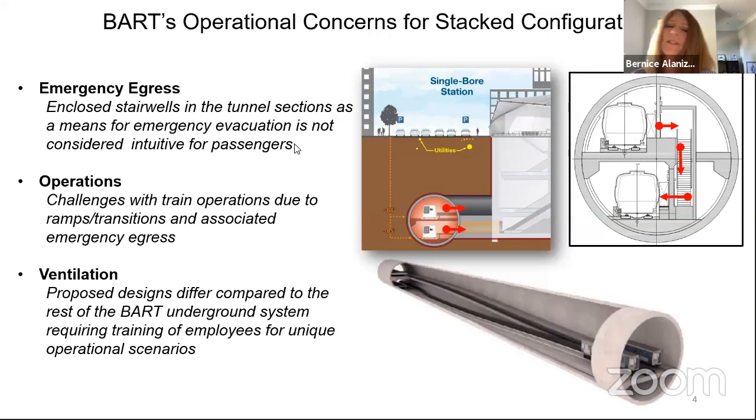We looked at both the larger bore along with both configurations that were analyzed in the environmental document, both the twin bore and the single bore. These three configurations were evaluated based on available funding constraints, federal funding process, environmental clearance, construction impacts, contracting risks, and innovation opportunities.